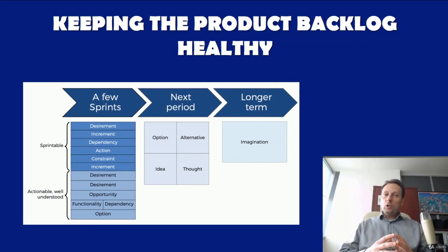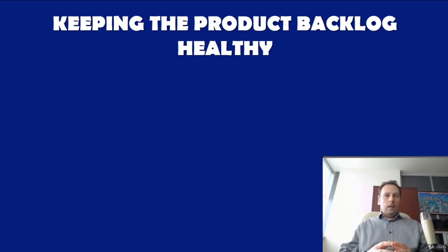Once the backlog gets larger, the product owner needs to group the backlog into near-term and long-term items. Near-term items need to be fully fleshed out before they are labeled as such. This means the complete user story has been drawn up, collaboration with designer and developer has been sorted out, and estimates from developers have been made.